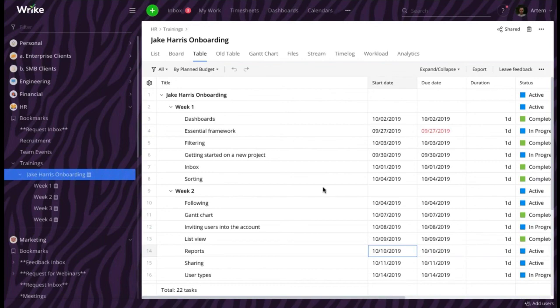So if you just open the duration, let me do that. I can just double click and enter 1 hour and it would change the duration of this task to 1 hour. So when you do that, the bar representing this particular task on the Gantt chart will no longer occupy the whole day, it would occupy just part of that day. That's also a great question, Tim.